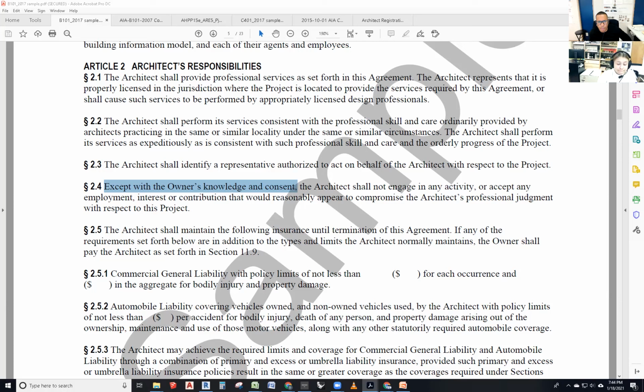If it's a design-bid-build on a public job, most likely you will issue an addendum to everybody. You don't even need to credit who said it. You can just say, "It's come to our attention that substitution of tile floor A for such and such may be an accepted substitution." All of them will do it. Let them all do it. That's not making a judgment change.